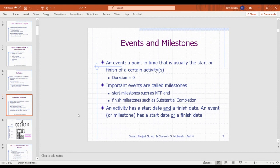it's sometimes when you're engaging a contractor and you're having them bid the project documents, and there's all kinds of considerations in terms of legal on the contract, all that kind of information that may take a little bit longer just to sort out, you know, bonding, whatever the issue is. Sometimes, instead of waiting until the formal full contract is signed by all parties, an owner or whoever can issue a notice to proceed, which will be in writing. Yes, this is the project. This is the current estimate. This is my authorization to proceed with the excavation, demo, whatever the first step is on project XYZ.